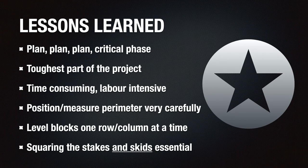Lessons learned for this phase of the project: be patient. The excavation and installation of the foundation elements are really critical aspects to the success of the project. Like the old adage goes, the stronger the foundation, the stronger the house — if you rush this part of the project, you're going to have a weak-looking pad. Without sophisticated tools like a laser level, it's going to take a lot of time to complete this phase, but it has to be done accurately or there are going to be some pretty important consequences later on.